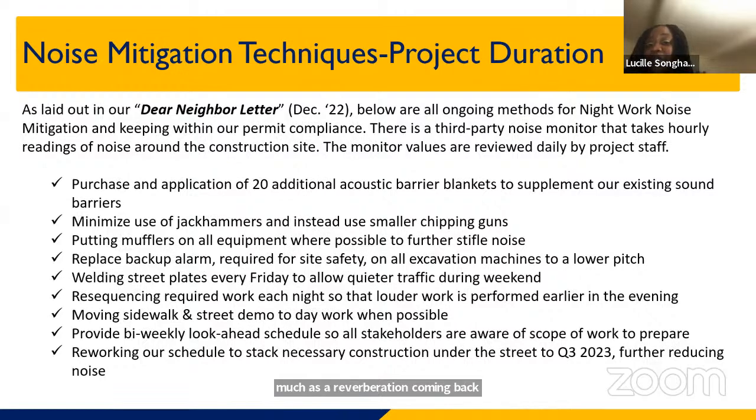Additionally, we have really tried to resequence our work every night, so as to do the louder work earlier in the evening. Our work hours are from 10 p.m. to 5 a.m. So if we have some of the louder work, we try to do that within the 10 p.m. to 12 a.m. time frame. Again, we recognize that it's hard for a lot of the residents, but doing some of the resequencing has been able to help us keep on track with this project, but also be mindful of neighbors above.